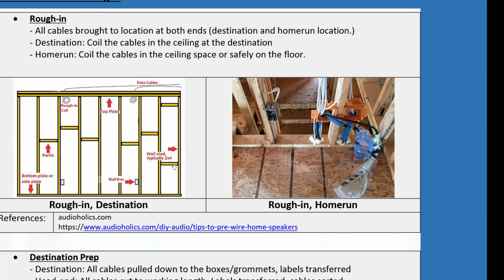Of course, you've got to talk to your lawyer when it comes to some legal details, but basically that's what it comes down to. Right? If you get paid by stages, rough-in, some other stage, and towards the end the general contractor goes bankrupt, then you still have that money that you worked for before. Maybe you are not going to continue with the job and not going to get paid the rest of the money, but the stuff that you did, you got paid for.